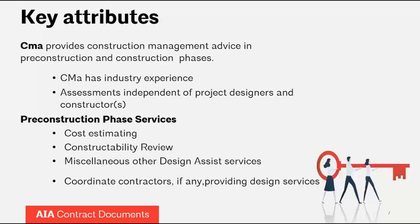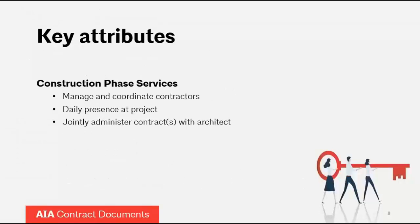Please understand that the actual responsibility for the adequacy of the design continues to rest with the design team. The CMA is also going to coordinate contractors who may have been engaged early to provide some elements of design services — for example, if the structural work needs some contractor input even before contracts are finalized and things move into the construction phase.